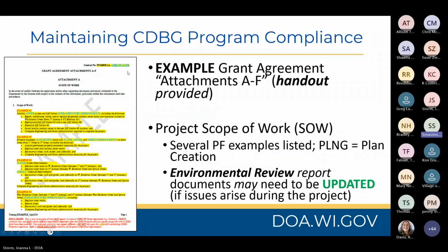For the project scope of work, several examples of typical scopes of work are included for your reference. For a planning project, the scope of work is to create the updated plan. Some details, such as linear feet, may not be included to allow for small adjustments as needed in your project. Additionally, roadway reconstruction may appear generic or without details such as particular layers in your scope of work.